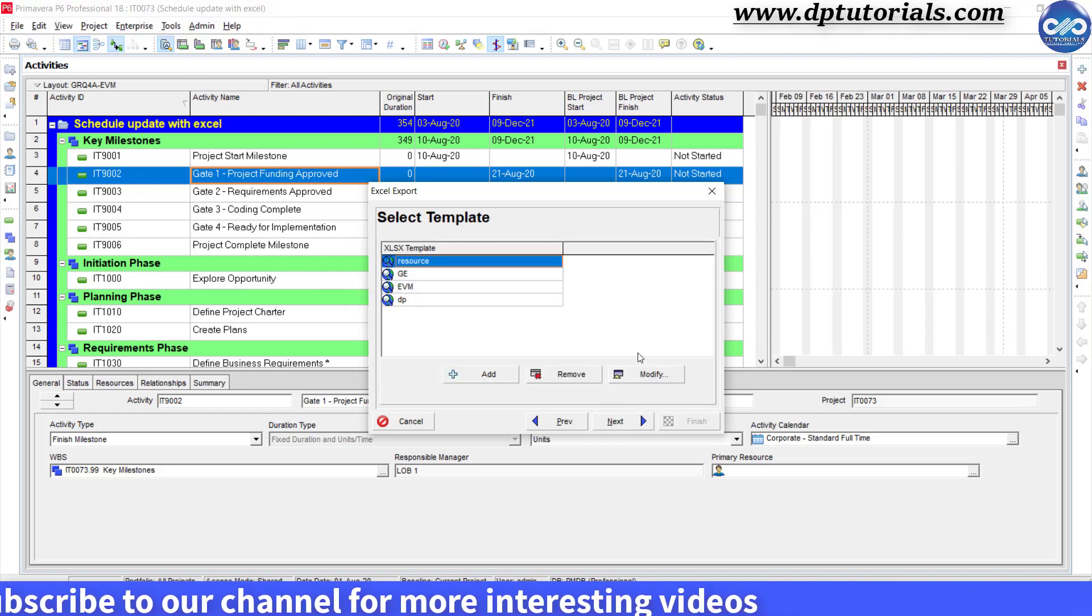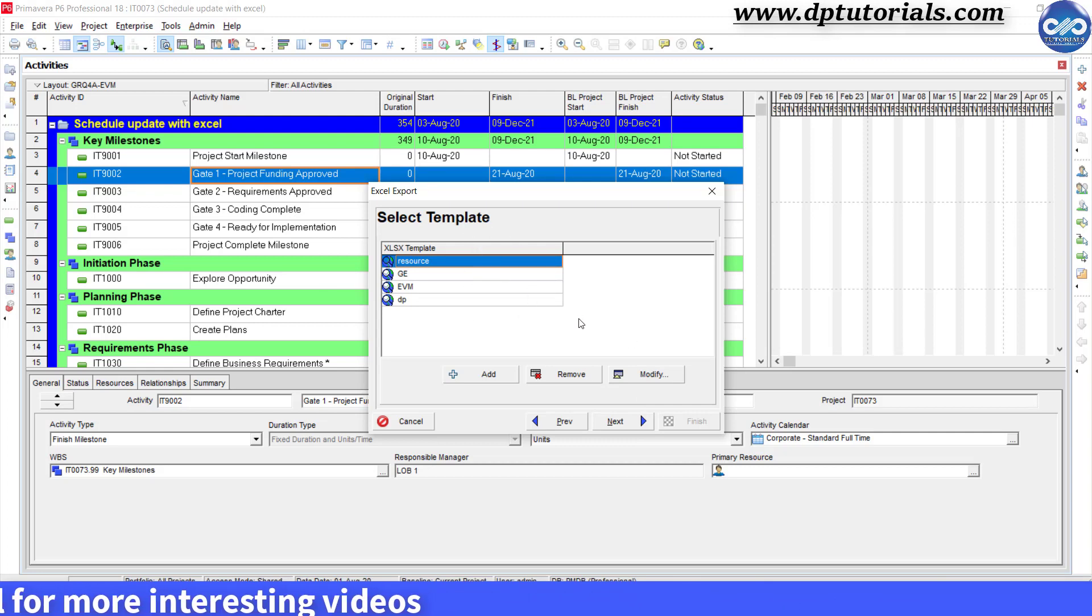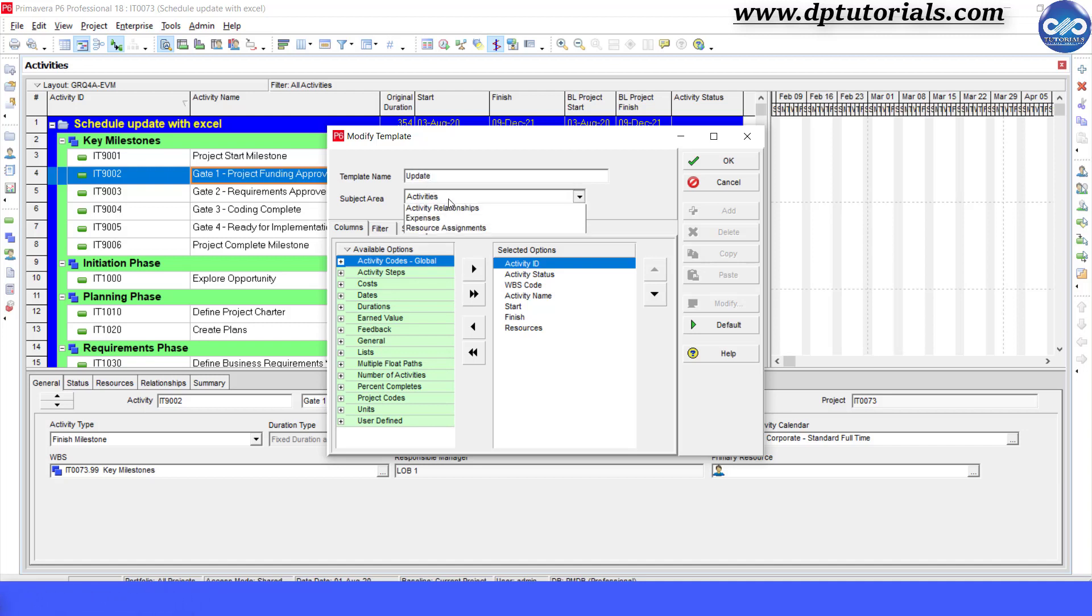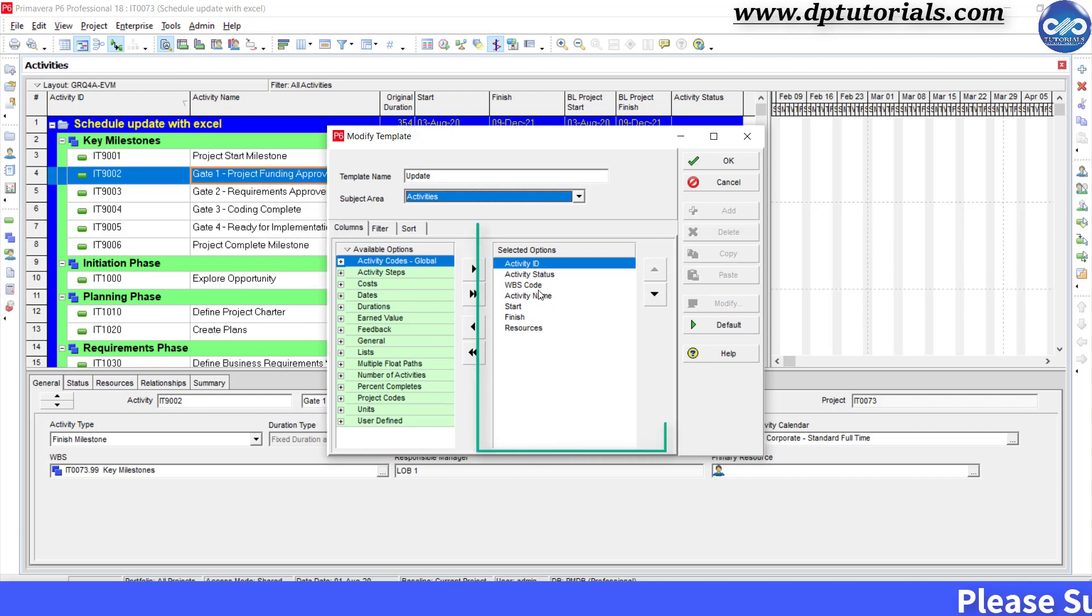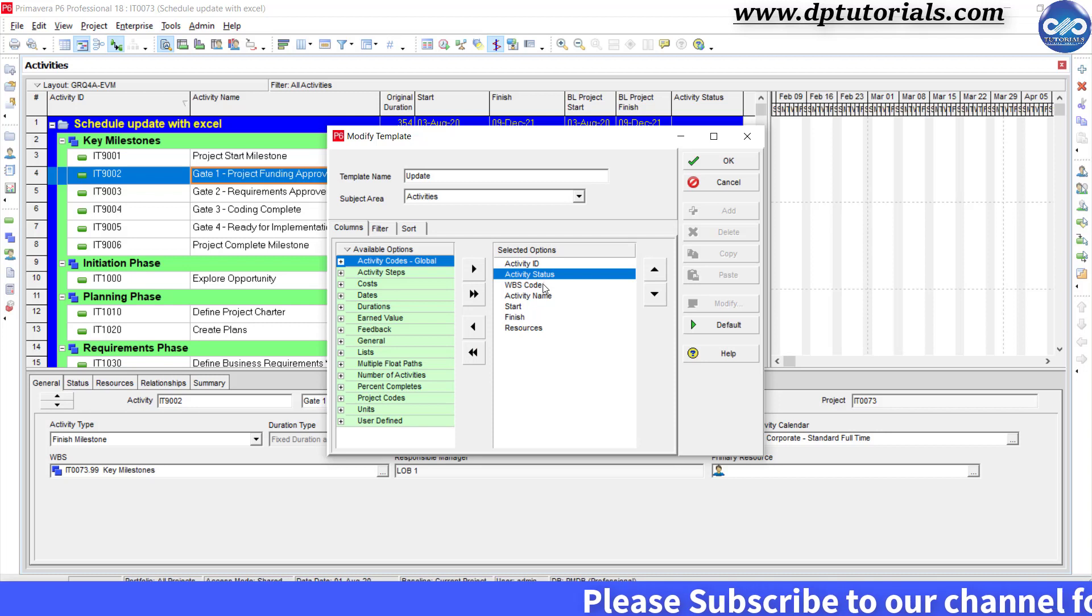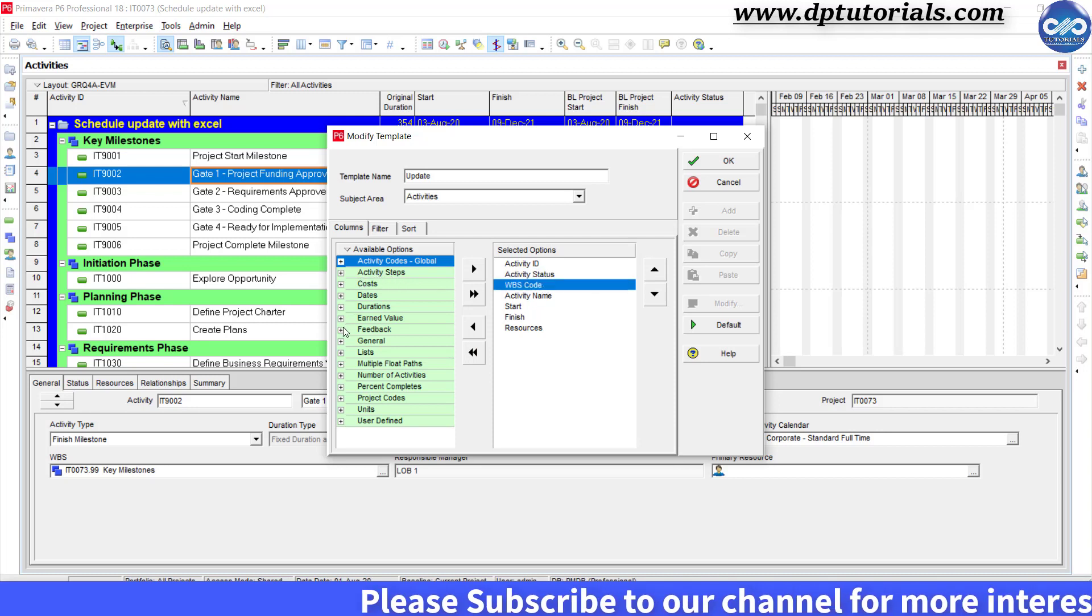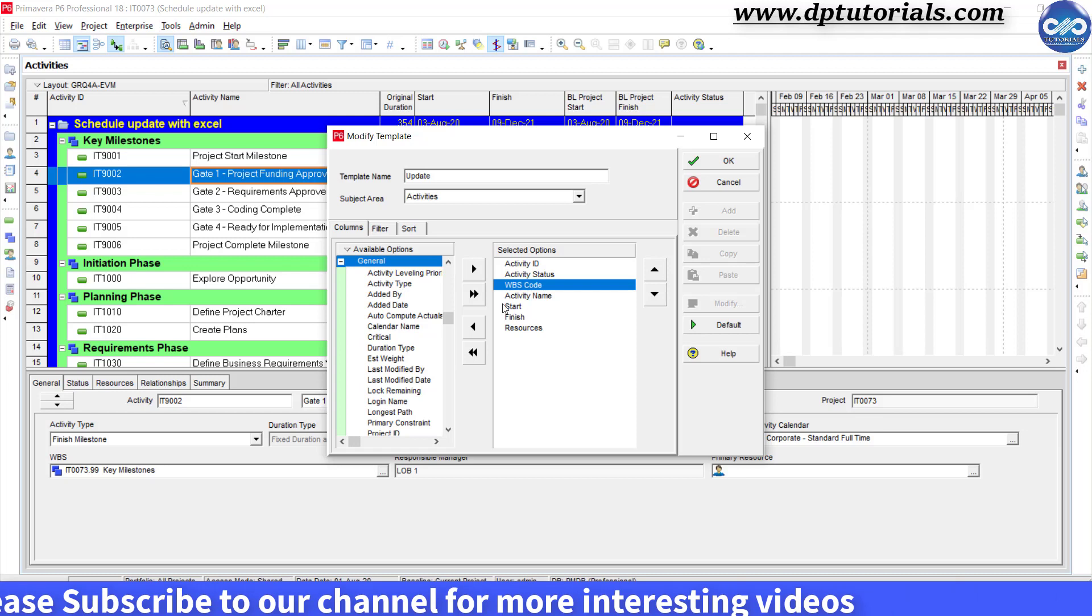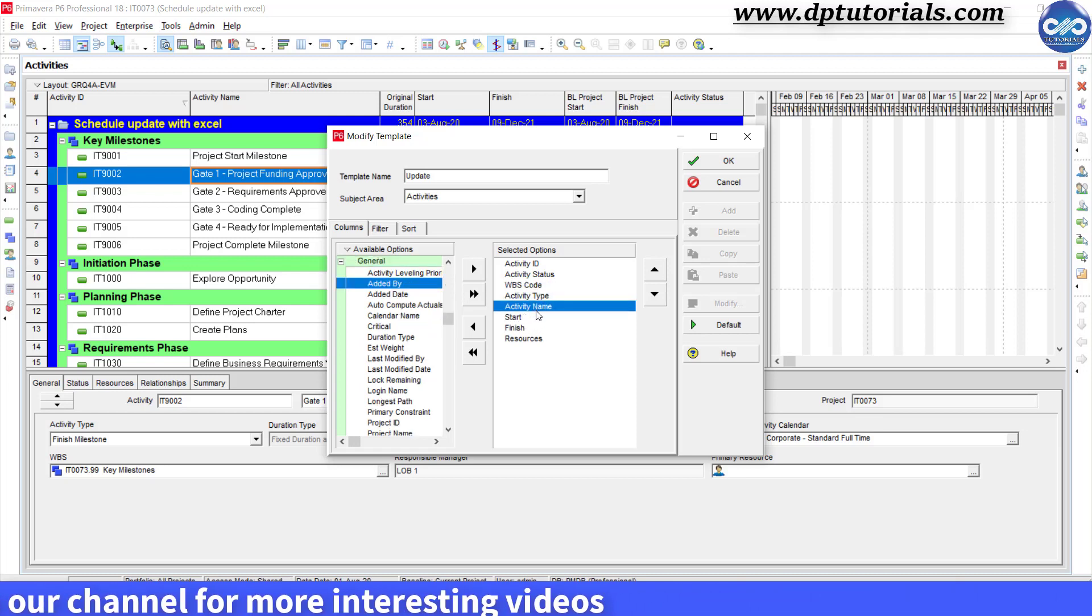In the select template dialog box, click on Add and give a name like 'update' and keep the subject area as activities. Then select the column tab and include all the fields like this: Activity ID, Activity Status, WBS Code, Activity Type, Activity Name.